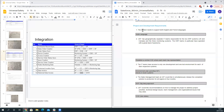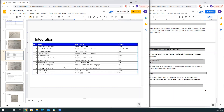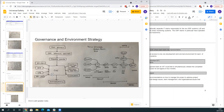For project and governance requirements, multi-language has already been covered. For geographically separate teams already operating with autonomy, we need to establish a central COE. The COE structure includes an executive sponsor as primary responsible individual, sitting on an executive steering committee, with a program owner heading the COE. The COE takes feeds from business and technical stakeholders, architectural review, change acceptance board, test leads, ERP and monitoring support teams, providing a unified view of project plans and dependency management. Importantly, a compliance team is a key member given the likelihood of compliance interaction related to regulatory requirements.